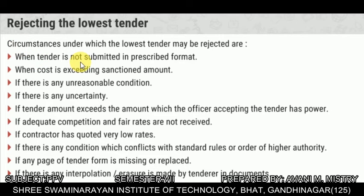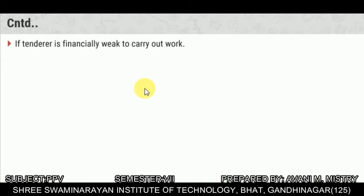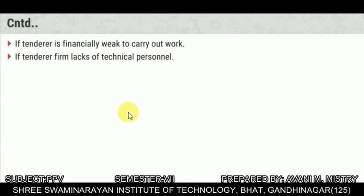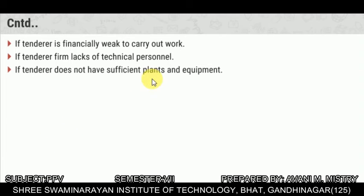Circumstances under which the lowest tender may be rejected: when the tender is not submitted in the prescribed format, when cost exceeds the sanctioned amount, if there is any unreasonable condition or uncertainty, if the tender amount exceeds the officer's accepting power, if adequate competition and fair rates are not received, if the contractor has quoted very low rates, if any page of the tender is missing or replaced, if there is any interpolation in the document, if the tender is financially weak, or if the contractor does not have sufficient plant and equipment.